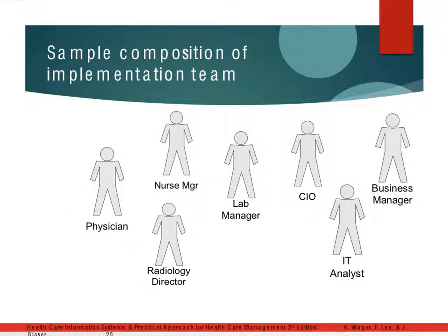An implementation team, if this was at a hospital, would have some of these people as part of the components. These people should do workflow and process analysis so they could actually do simulations ahead of time, just to map out the workflow and make sure that things are smooth before the implementation goes live.